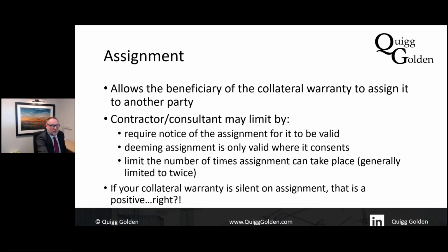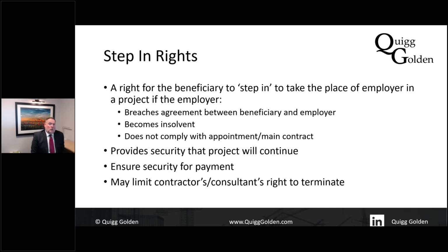Depending on the nature of the collateral warranty, we could sometimes see step-in rights. So let's say we're the funder and we are looking for a collateral warranty from the main contractor. Well, one of the risks the funder might face is that the developer goes bust. And so what they might have is a clause there saying, if the developer goes bust, we can step into the developer's shoes and effectively become the developer in the main contract and continue to pay you, and you have an obligation to complete the building.